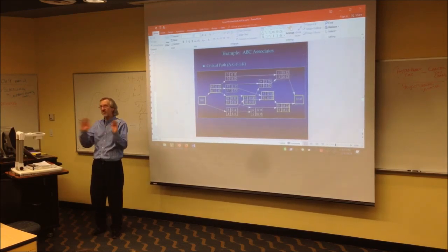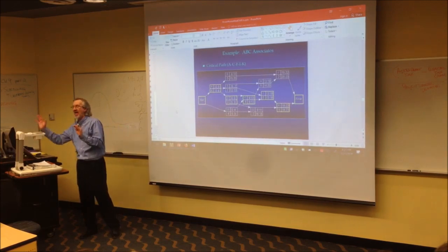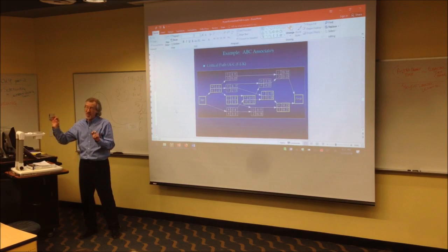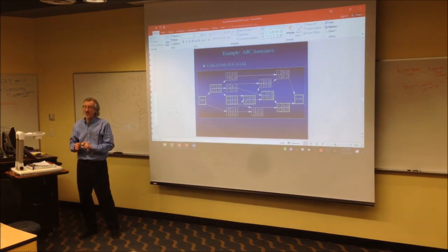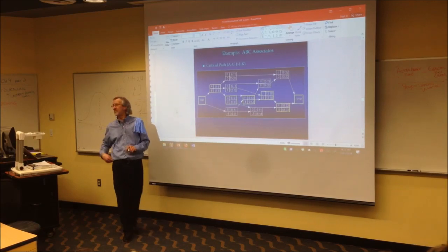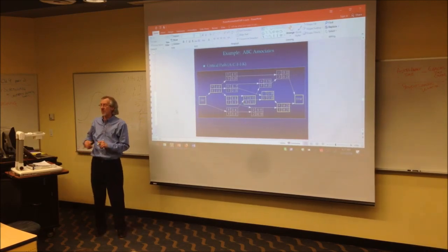Do not convert those variances until you've got them all added together. Let me say that again. You find the variances of only the critical path and you add them together. Now, the formula for finding the variance is about 2, 3, or 4 slides back. So we're going to try one. I want to make sure you get it.